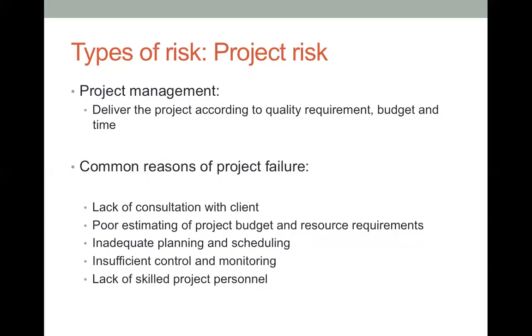requirements. Probably we are too ambitious in terms of project budgeting. So we set a high aim for our revenue in regards to the project, and we under-resource, so that our project fails when we push the button. Inadequate planning and scheduling, which is another common failure. Insufficient control and monitoring. Now this one here is also quite common. A lot of project managers may fail to deliver the project results because of poor control and monitoring.